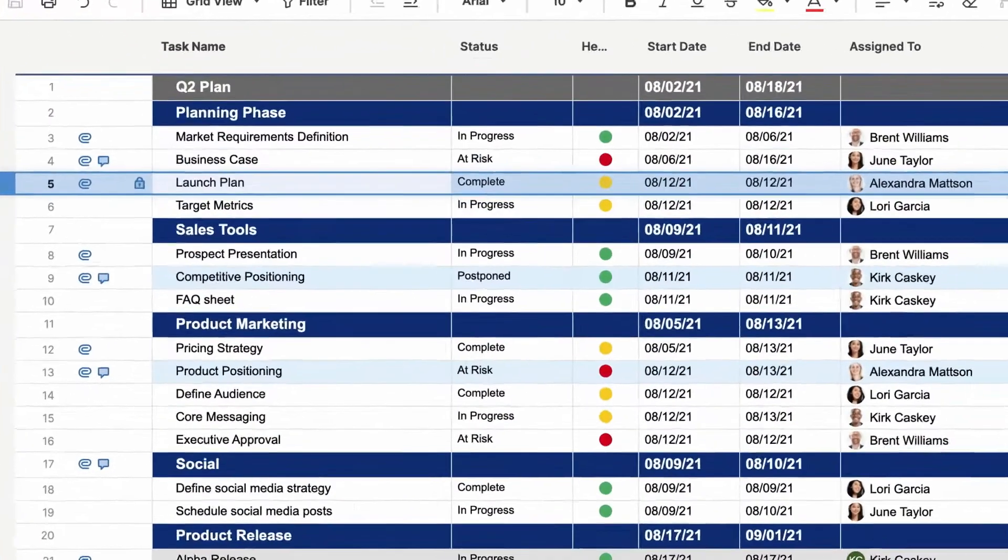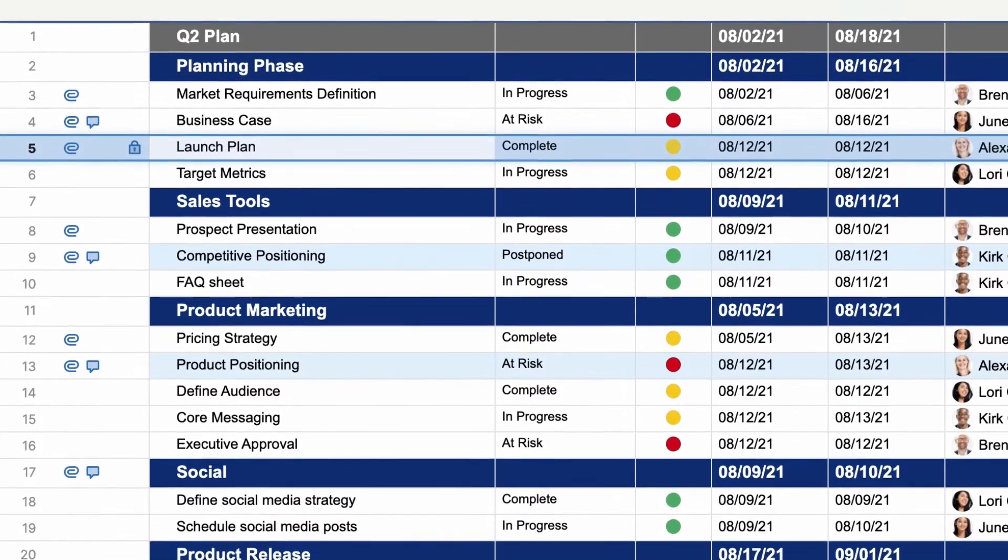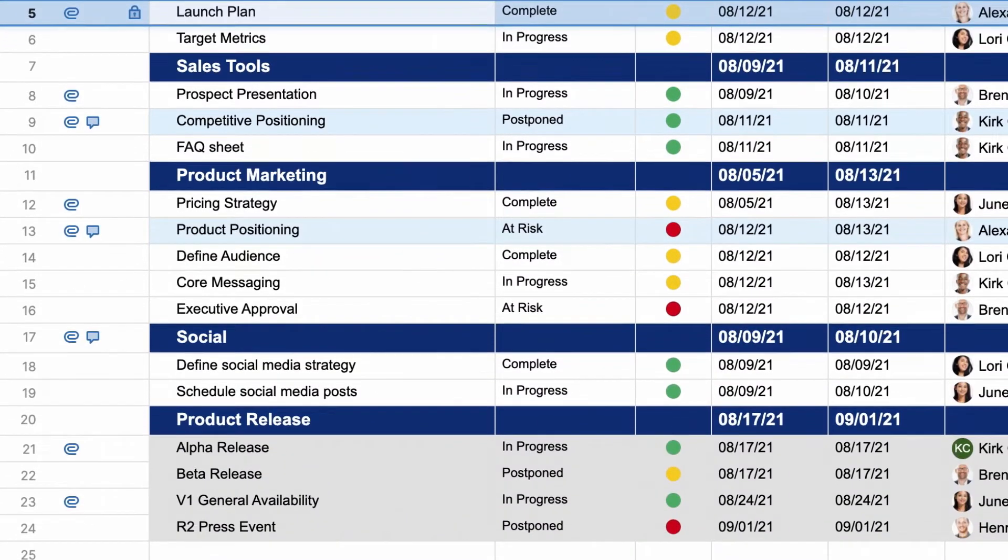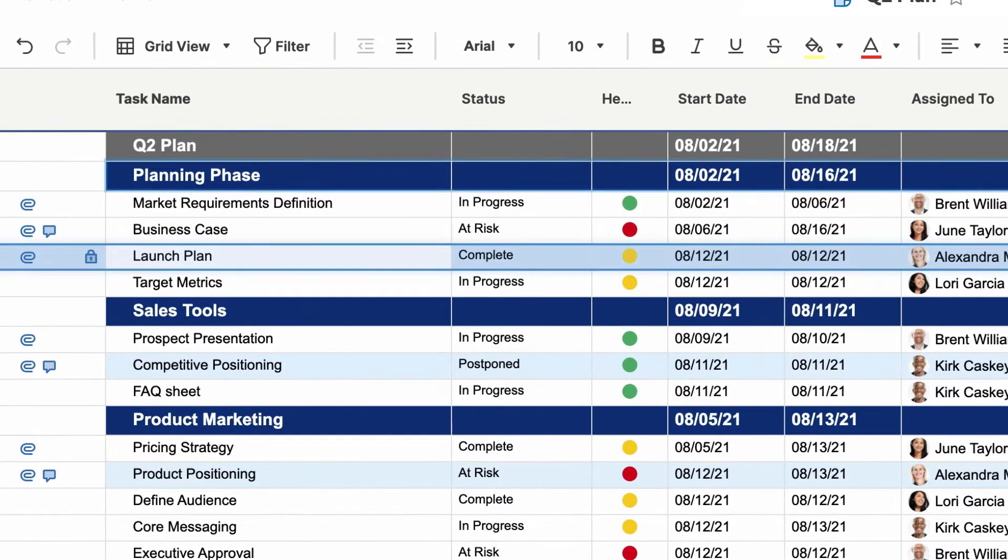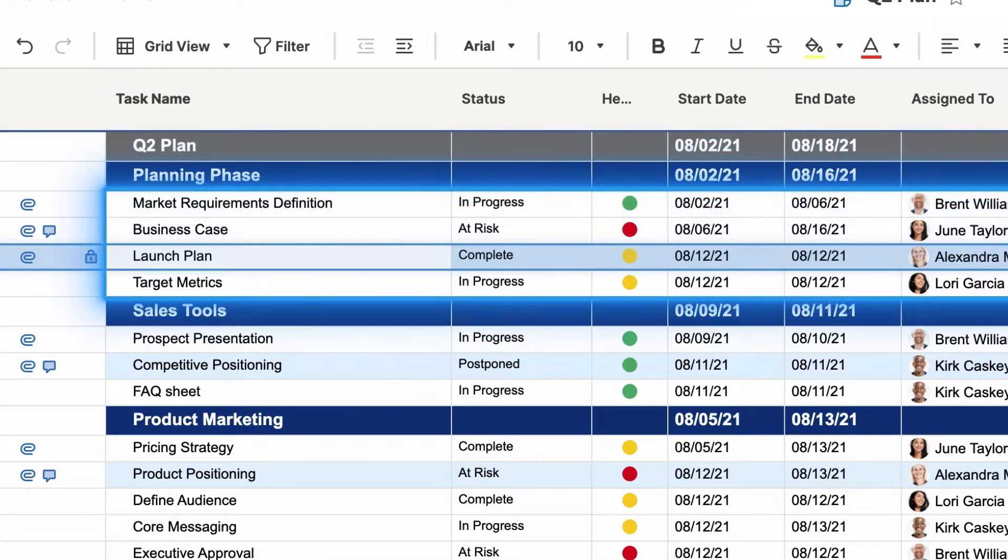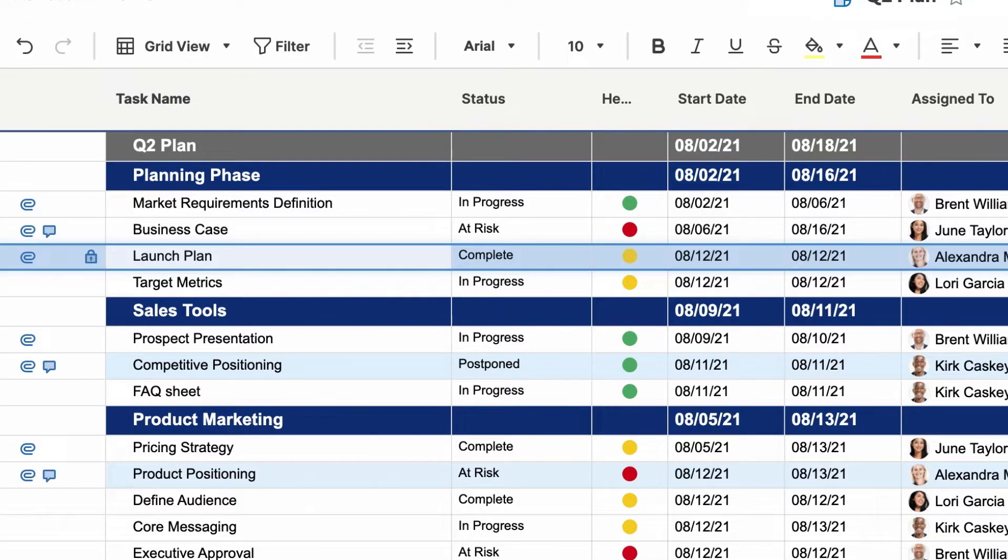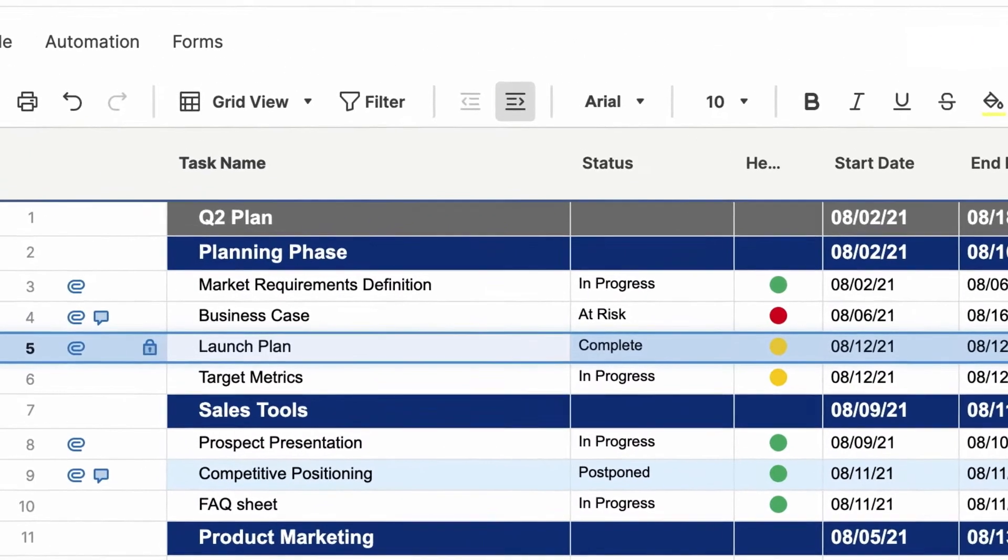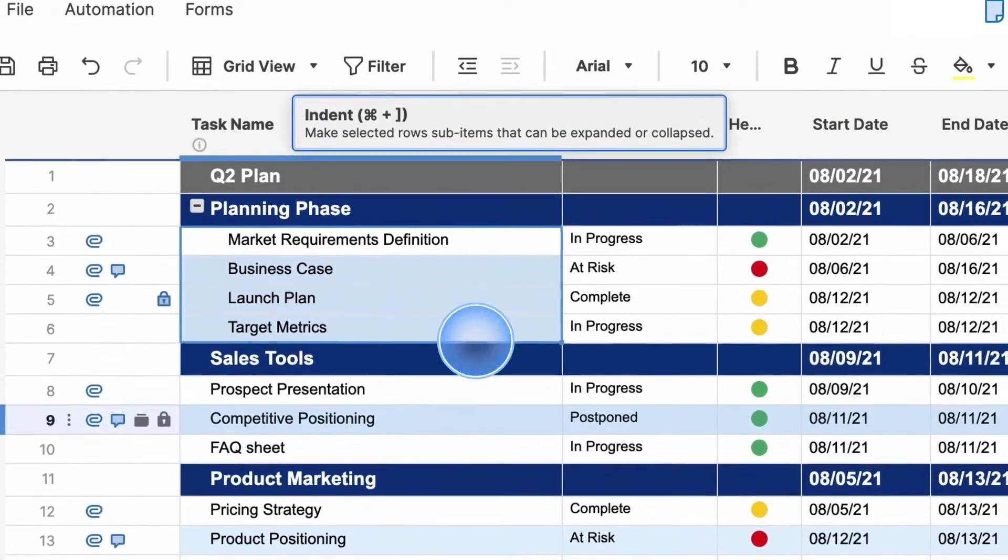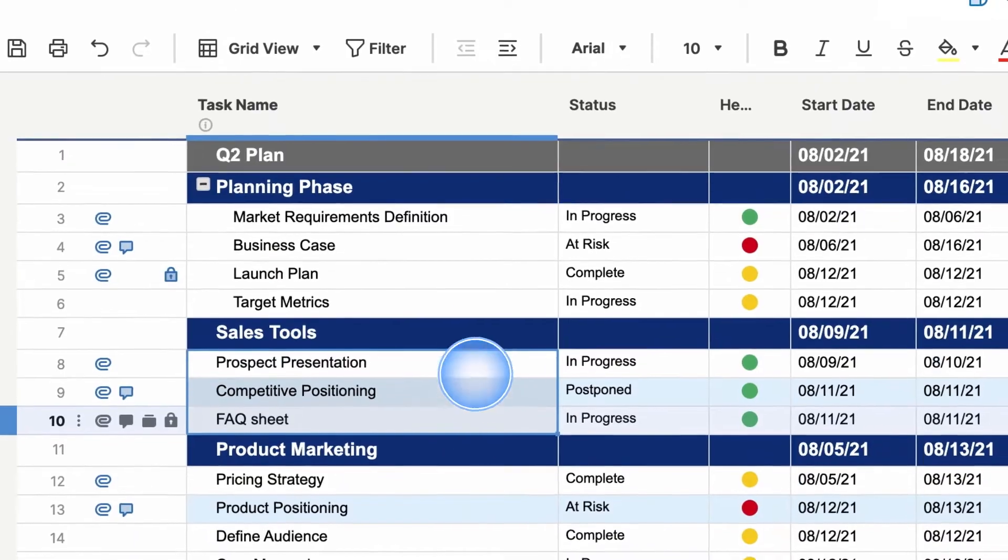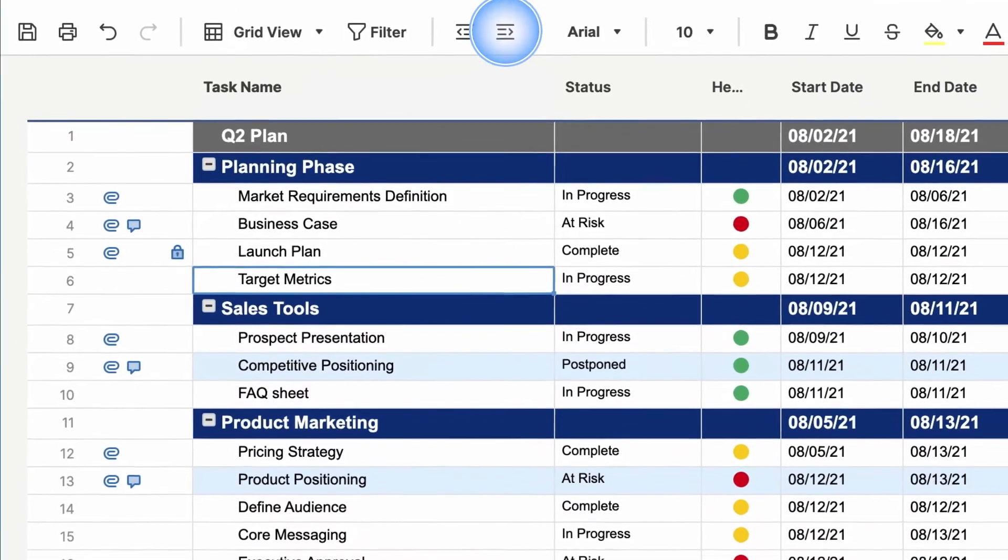Hierarchy shows how different tasks relate to each other and helps keep this sheet easy for everyone to use. Hierarchy is made up of a parent row and child rows, or tasks and subtasks, and it's added in the primary column. I'm going to organize this project in phases. I'd like each phase to be easy to spot, and all of its subtasks organized together. The indent icon sets up this relationship. But I can out-dent it if I need to make changes to how I'm setting this up. I can even make subtasks of subtasks if I want.